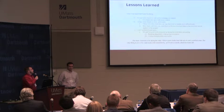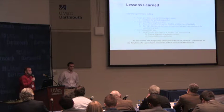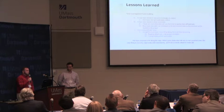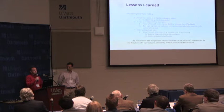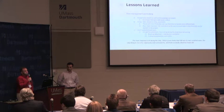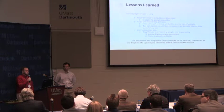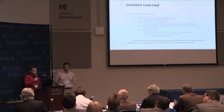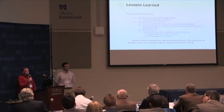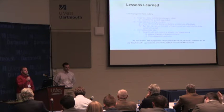A couple of lessons learned fall into time management and tasking. It's important to assign tasks based on skill set, and to give people with more free time the simpler tasks — assigning the hardest tasks to the wrong people will prevent completion and inhibit the final product. Another critical lesson is to never underestimate tasks: something as simple-sounding as writing to an SD card or hooking up an ADC or DAC to a board is really not easy at all. Definitely allocate more time to such tasks. When given tasks outside your comfort zone, the best thing you can do is try vigorously and consistently.